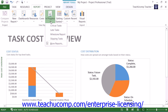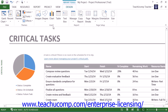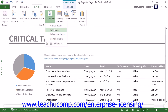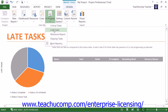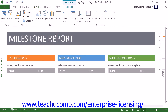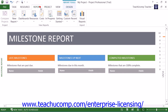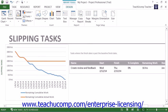Under the Progress reports category, you have Critical Tasks, which shows all tightly scheduled tasks listed as critical on your project's critical path — these are tasks that, if delayed, will cause the schedule to slip. You also have the Late Tasks report, which shows all tasks that start or finish later than their scheduled dates. The Milestone report shows the status of all milestone tasks within a project file. The Slipping Tasks report shows all tasks behind schedule with a finish date later than the finish date within a selected comparison baseline.